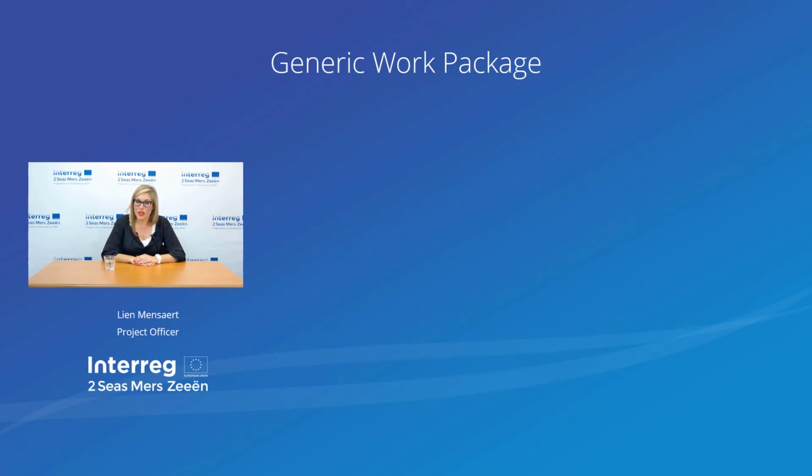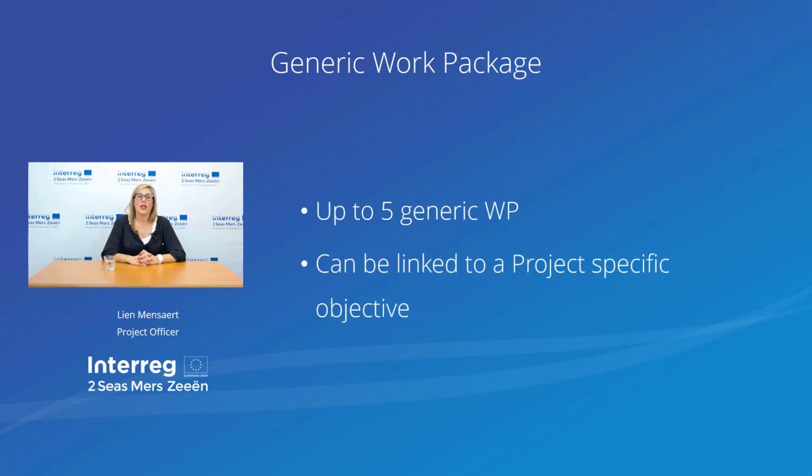Then we go to the generic work packages. When we look at generic work packages, every project can have between 1 and 5 generic work packages. For most projects, generic work packages will be linked to the realization of one of their project-specific objectives. So again, I refer to the video about the intervention logic to make the clear link between a work package and a project-specific objective. Every generic work package should lead to at least one output and will have several deliverables